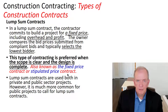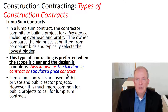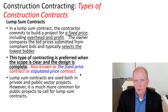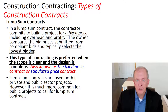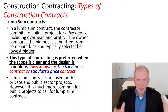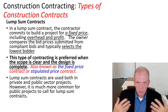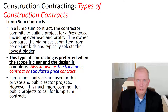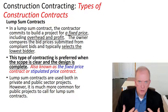Lump sum contracts — also called fixed price or stipulated price contracts — set the price for the whole project from the get-go. You need really well-developed drawings and specifications because that's what the price is based on. If there are a lot of changes once the project is underway, you lose the benefit of a lump sum. In some cases, the value of changes can reach 50 to 100 percent of the contract price — at that point you don't really have a lump sum anymore.